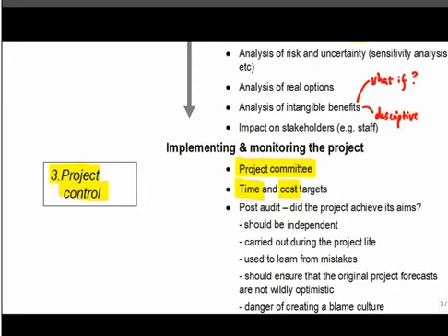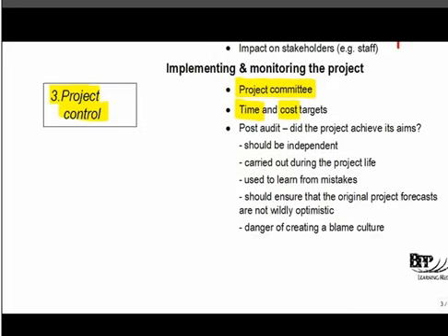Once a project has been implemented, we'd expect one final control. A post-completion audit is commonly used by most large companies to assess whether a project actually delivered the benefits, for example the NPV, that was originally being forecast. This is the most important topic in the chapter, but it is a simple area. We'd normally expect a post-audit to be carried out a year or two after a project has gone live, so it's being carried out during the project life.